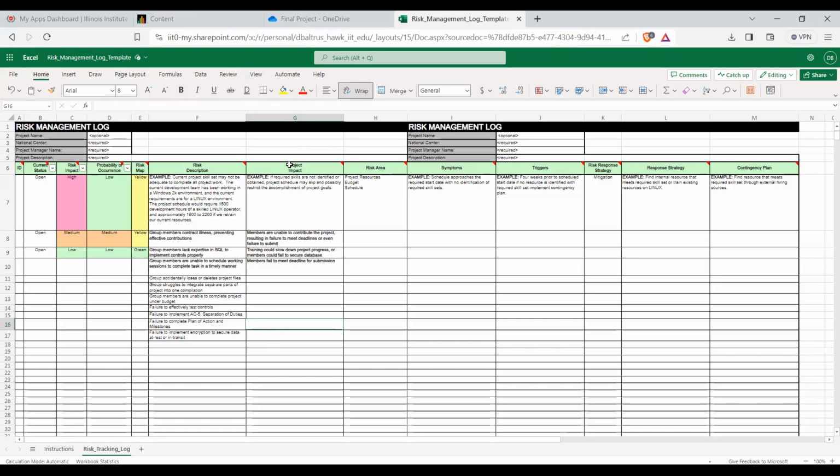Generally, a plan of action and milestones is needed if you have issues with the controls. Say you need to implement controls, and there's one you can't implement yet. The plan of action and milestones should tell your customer that, hey, you will implement this. It may take a few months, but in the meantime this is my plan and actions, and these are the milestones I will meet. So that's what that is.